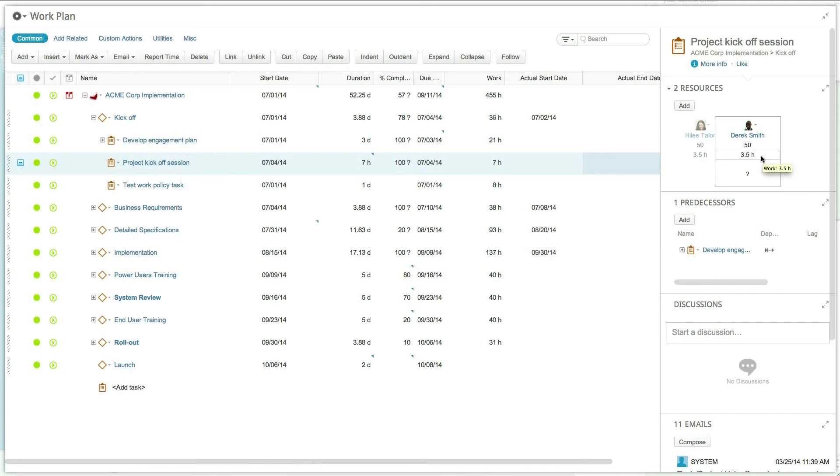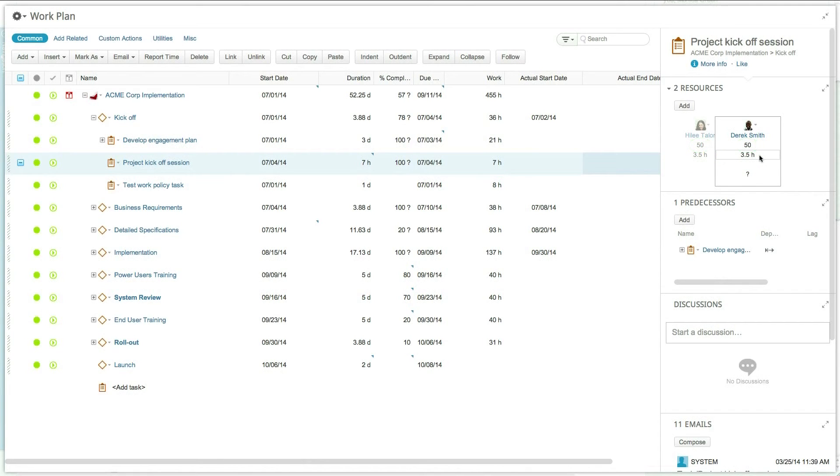Clarison automatically calculates the values of duration, work, and unit based on the selected work policy.